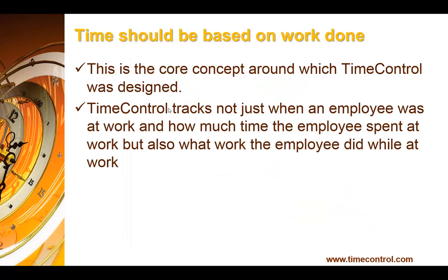One of the core principles of Time Control is not just when the employee was at work, but what did they do with their time? And there are numerous ways that we can track that with Time Control and take advantage of that, not the least of which is the ability to link Time Control directly back to a project management system like OpenPlan or Primavera or Microsoft Project or Project Server. Being able to have the links directly from project management right into the timesheet so that people are updating the work that they actually did, and advancing not just the actual hours, but also the estimate to complete for that work.